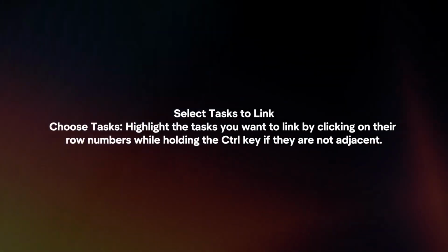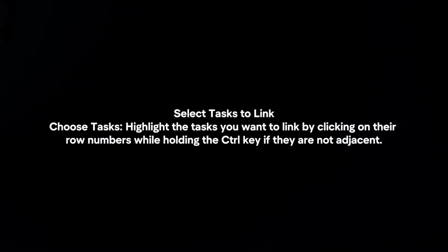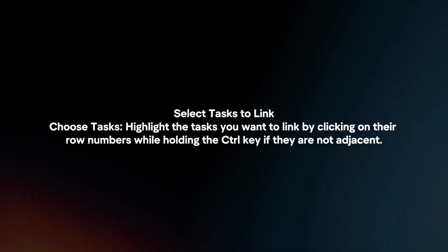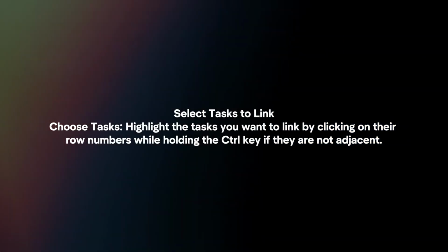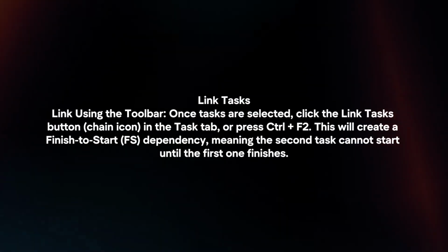Select tasks to link. Choose tasks. Highlight the tasks you want to link by clicking on their row numbers while holding the Control key if they are not adjacent. Link tasks.